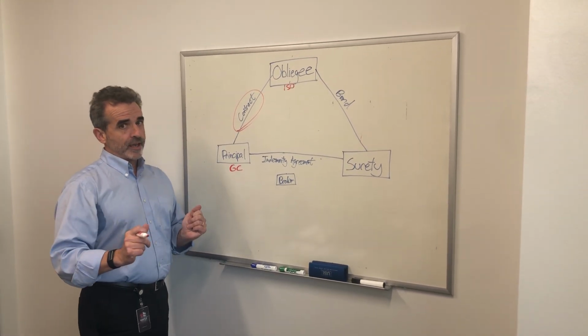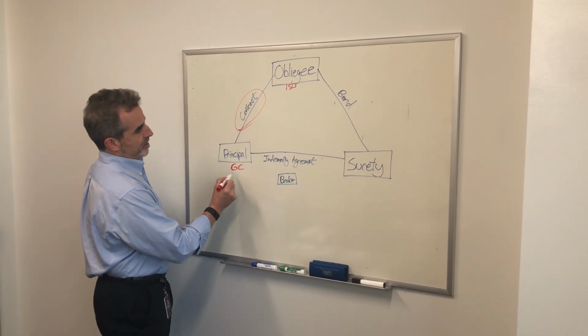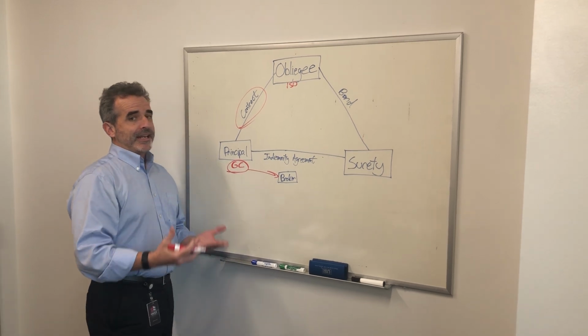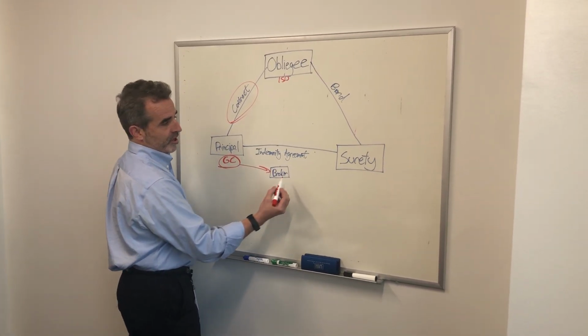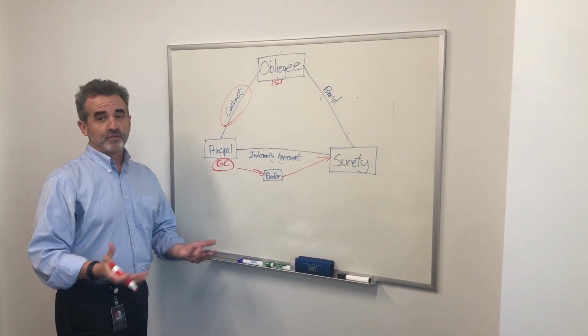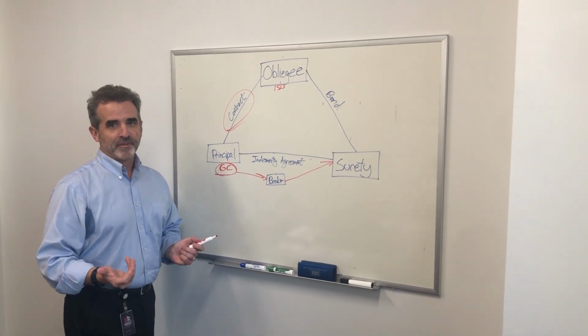So in order to do that, and this is actually required by statute, the GC is going to reach out to his broker and say, hey, I need to get a bond. Working with your broker, you reach out to a surety underwriter, which is like a big insurance company, the large ones that like to advertise on PGA Tour events.